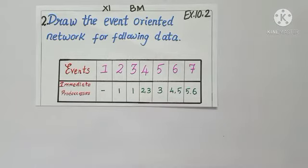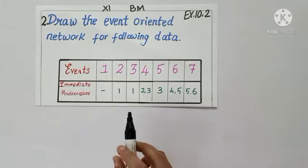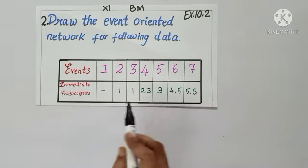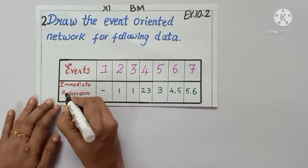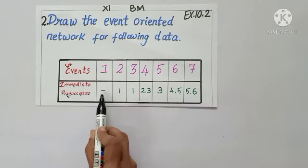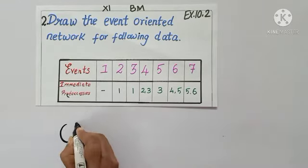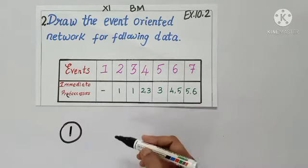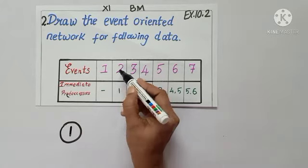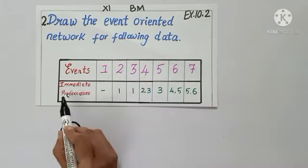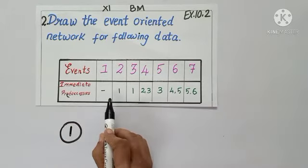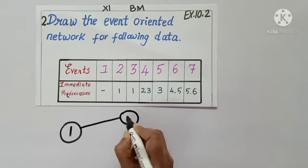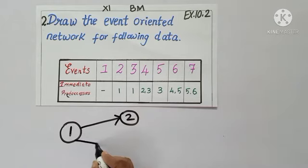Question number 2: Draw the event-oriented network for the following data. Here, activities are not given — we need to just mark the events. Only numbers are given, so we are given the predecessors. Before event 1 there is nothing, so event 1 is the starting event. After 1, I have event 2 and event 3.